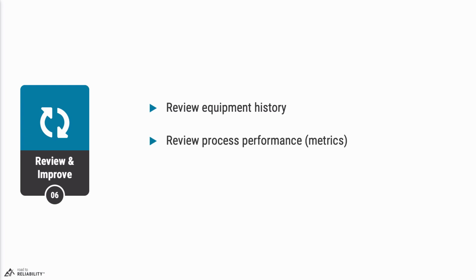That's another process. And so we're not going to go into that part of the improvement cycle as part of this course. The second way of looking at improvement is actually looking at how your planning and scheduling process is working. And using a standardized set of performance metrics, you can track if your performance is trending in the right direction. Are you getting enough work done? Do you still have a lot of emergency maintenance breaking into your frozen week? How good are the job plans as created by your planner? Are the estimates for the job durations reasonably accurate? Do you still find yourself wasting a lot of time looking for materials that were not identified in the job plans?